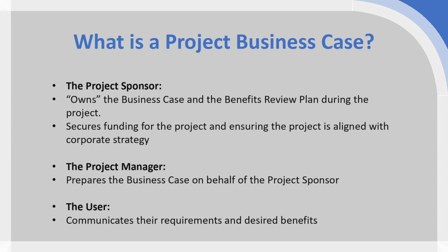So if we look at how it fits into the actual management of a project and the internal parties involved, we can identify three distinct parties that have a direct input or interest in the business case. So you have the project sponsor. You'll see this named in different ways in different project management methodologies, but sponsor is used in PRINCE2 and the APM quite commonly. So this is someone within the management of the organization, typically senior management, who owns a business case. This doesn't mean that they write the business case, but it's their project, it's their business case, as well as the benefits review plan.